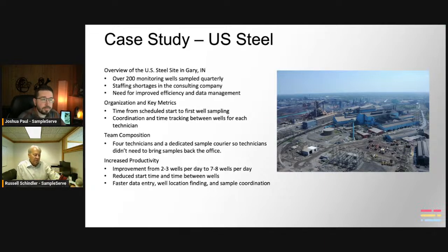You go out and you sample a well. It's really difficult to speed up the sampling, especially when you're doing low flow. There are some things you can do to make it more efficient, but it's going to take time to stabilize. What I found is that from sampling event to sampling event, a well is going to perform similarly every time. It's not like one time it can be sampled in 18 minutes and the next time it takes 45. It's usually right around 18 minutes every time. And so having that information readily at hand, which we provide, is great.